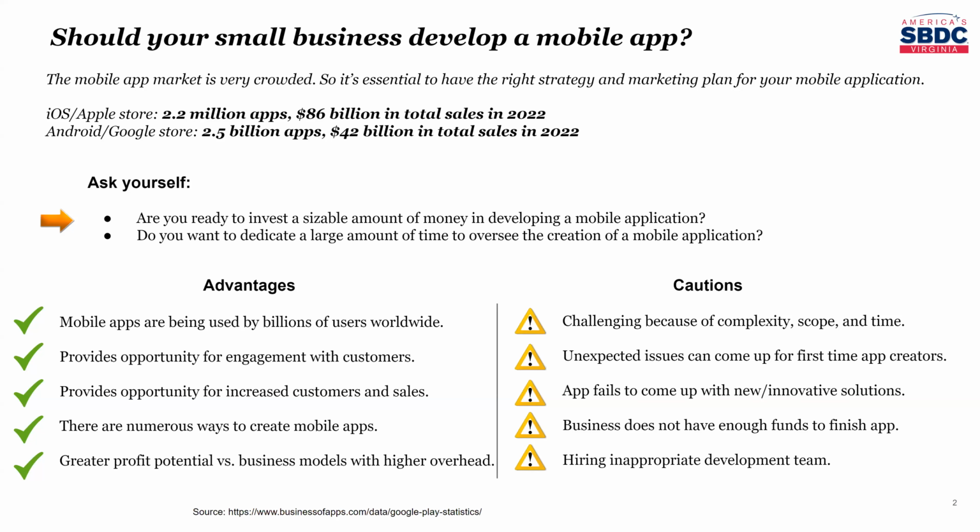So one of your first choices is going to be, well, which store are you going to launch your app in? You can, of course, launch in both stores. That's completely fine. Keep in mind, it will increase your time and development cost by roughly 20 to 50%, depending on the features of your app. So it's hard to recommend one over the other without knowing the specifics of your business. But if you'd like to ask and give me more details about the type of app, I can maybe suggest which store would be a better fit for it.